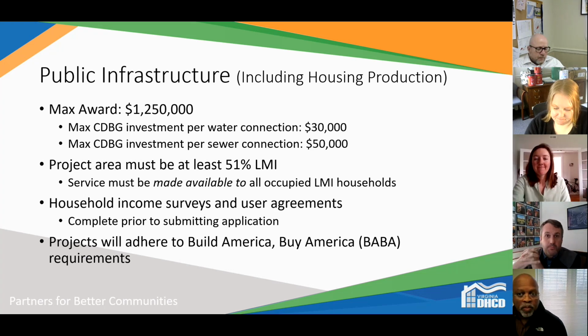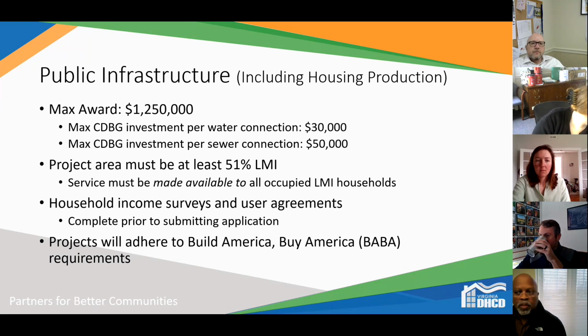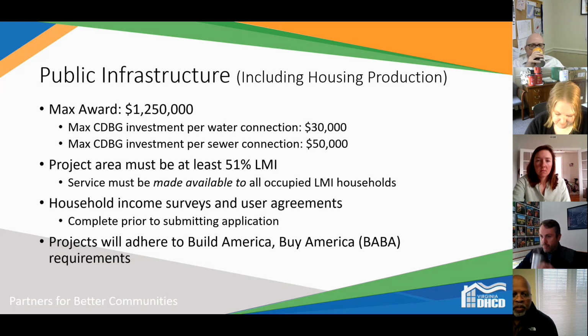Absolutely. Thanks. So the Build America, Buy America is not just limited to CDBG funds. If you use other federal funds in your project and that kicks it up above $250,000, if you have $250,000 from CDBG and $1 million from somebody else, it's still likely to be a requirement of this.